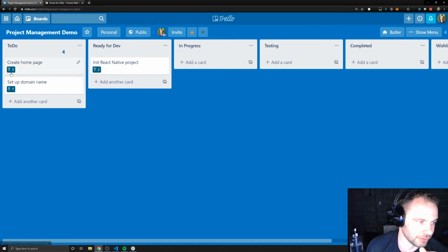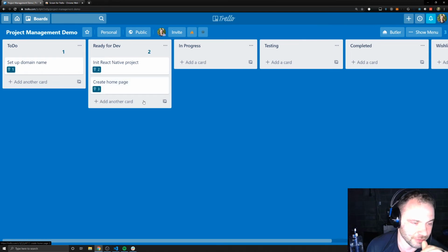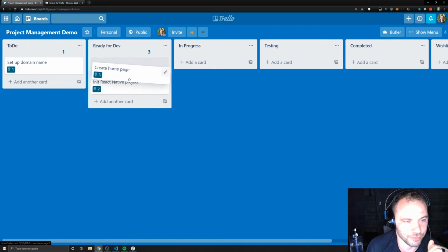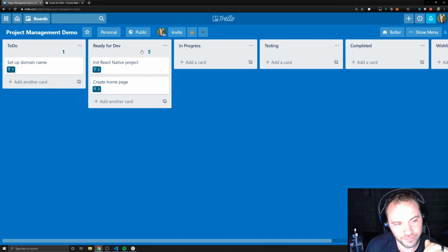Well, then I'm gonna look here and say, well, you know what? I got 4 of these in. Let's see. I think I can do this. I can initialize the project, and I can create the homepage. And that's gonna be my goal. I don't know why I didn't automatically add that. That's weird. There we go. So now I can see, like, all right, I think I can get 5 in. So you see how the estimates now determine how many tasks and which tasks can go into here.